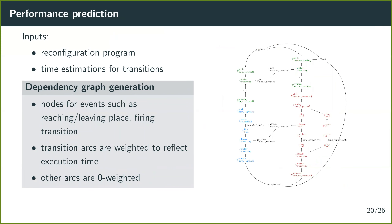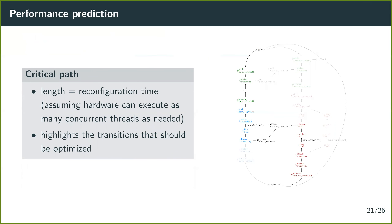The second contribution is predicting the execution time of a Concerto reconfiguration program. The inputs are the reconfiguration program, the set of control components, and the estimated execution time for each transition. The execution of the reconfiguration program is translated into a weighted dependency graph, where arcs representing transitions are weighted with execution times. The predicted execution time is then computed as the critical path — the longest weighted path — through the dependency graph.